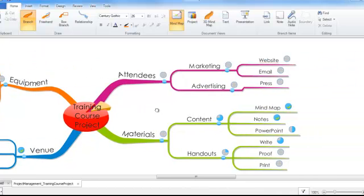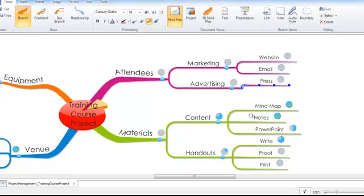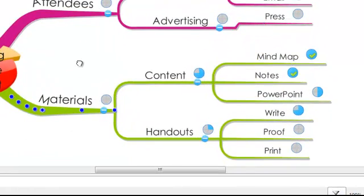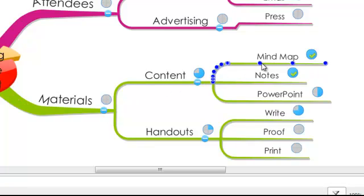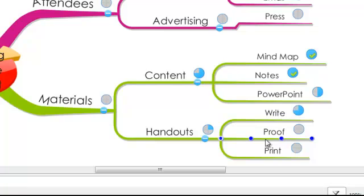One of the important things when you are mind mapping a project is to make sure that the final branch is your actual task. So materials isn't a task, it's a category, but the mind map is the actual doing part of the project. So make sure you've set your mind map up correctly in this structure.